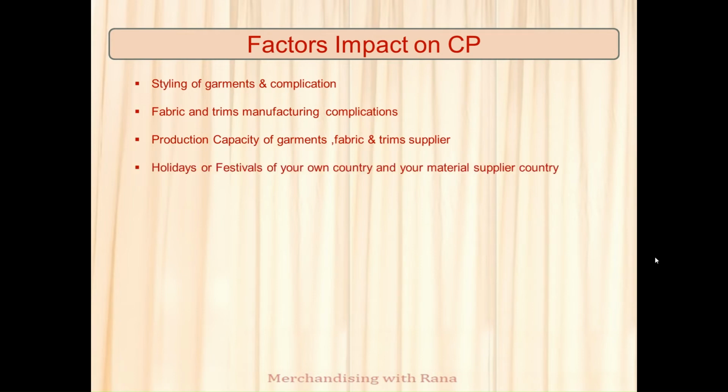Holidays or festivals of your own country and your material supplier country. It is very important for lingerie merchandising because of CNY, I hope you know this term. CNY has a great impact on lingerie lead time. Next year it will start from mid-January, and also Eid holidays of your own country. So you need to consider this in CP. Logistic facilities and difficulties.